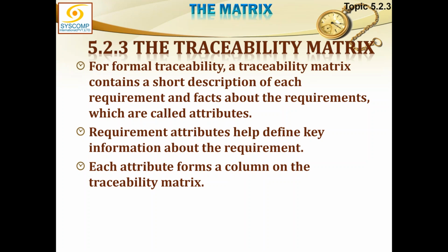Requirement attributes help define key information about the requirements. Each attribute forms a column in the traceability matrix. So every column in the traceability matrix basically stands for one attribute.